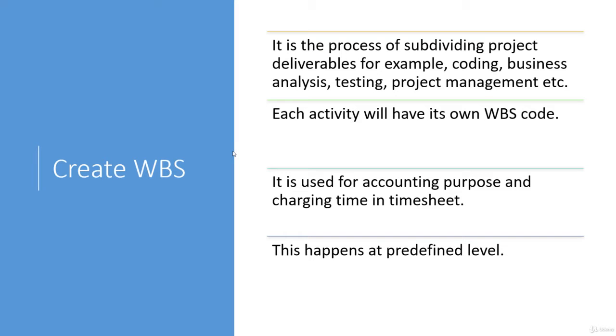Let's say a year down the line, you want to generate some kind of report to understand the distribution of overall efforts. Having better decomposition of work in the format of WBS will help you in better understanding. So try to decompose your work in the best possible manner and avoid these high level ones. Now, of course, your high level WBS will be required, and we will see how they are used. But the point is, try to have maximum decomposition.